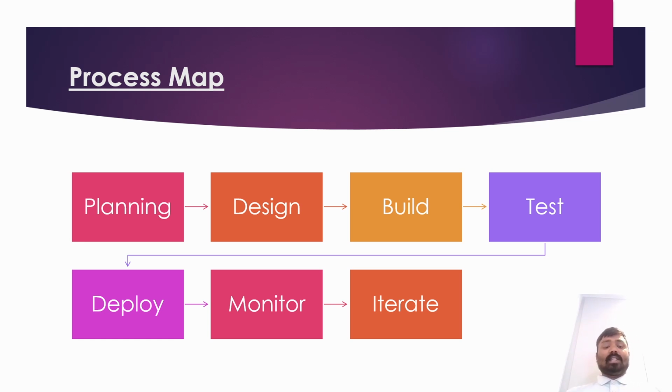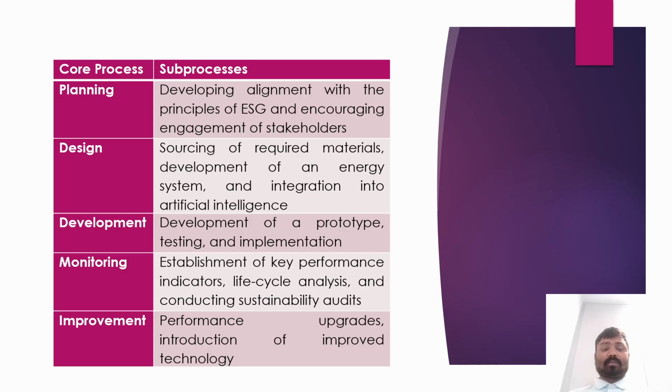Procurement and supply chain: embedding circularity. The third stream is the process of procurement and supply chain, where I laid out 6 steps: supplier pre-qualification using an ISO 14001 compliance checklist, a sustainability scoring matrix ranking vendors on emissions, waste management and labor practices, contract negotiation embedding ESG clauses for take-back and recycling, logistics planning optimizing routes to minimize transport carbon, supplier audit, on-site visit or remote digital auditing, and final approval and purchase order issuance.